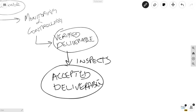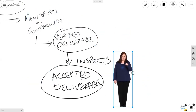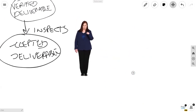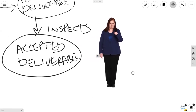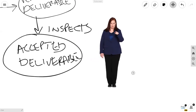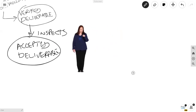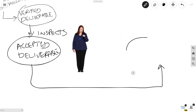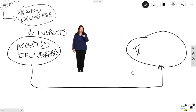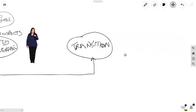When we talk about the inspection of the deliverable, we must remember the sponsor — Tanya — could get involved, and end users could get involved, but ultimately the sponsor has a huge say. If the deliverable is accepted, we can then transition the deliverable to our customer or end users.